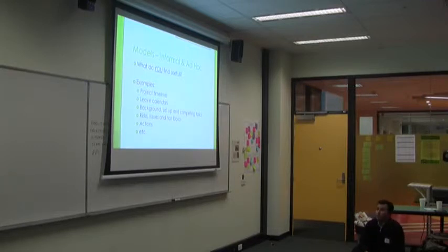So some of the other things that I've done are to do, doing and done. Didn't really estimate these tasks. Just had the tasks we had to complete in order to deploy into production. Deployment readiness reviews or disaster recovery plans, all those sorts of things might go on there so that you can actually track and manage them, and do that separate to your story wall. Risk, issues and hot topics, and you might put actions up as well. Make those things visible if that's useful for you to do.